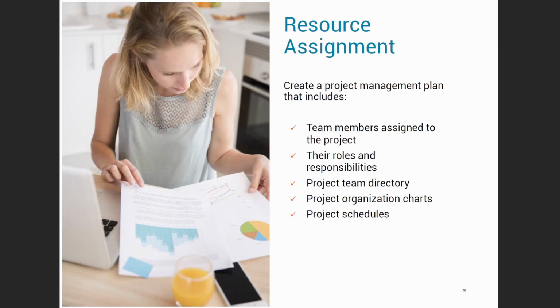So for the resource assignment, the project manager needs to create a project management plan that includes team members assigned to the project, their roles and responsibility, project team directory, project organization chart, as well as project schedule.